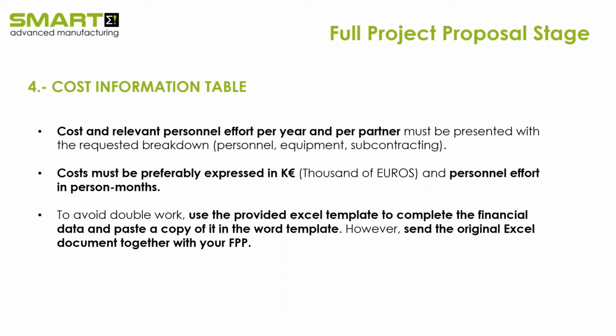What is being requested here is for you to provide the cost and personal effort per partner and per year. Also make a breakdown of the cost in terms of personnel, equipment, subcontracting. It's preferable if you express your budget in thousands of euros, and the personal effort in person months, as in many other international initiatives like Horizon 2020.